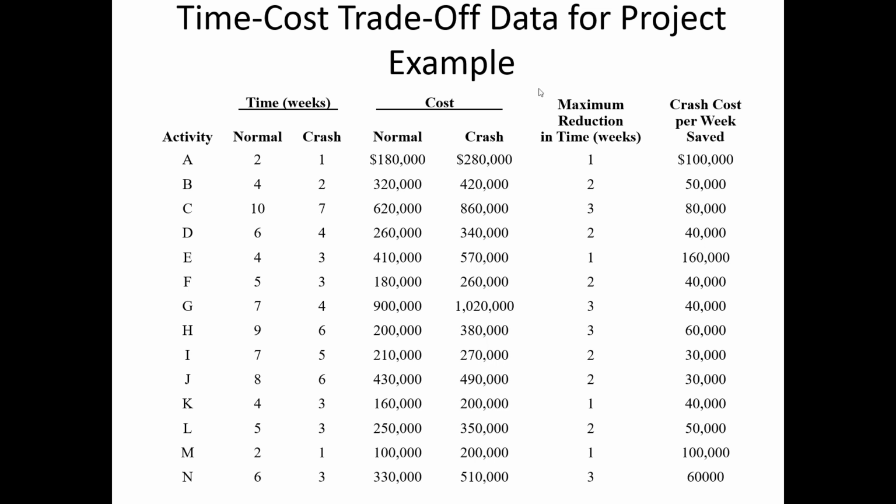Well, we look at A, $100,000, that's a lot of money. B, 50,000. A lot of money, but better than A, so B is winning right now. C is 80,000, too much. What else do we have? We have E, 160,000 for E. Well, E is out. There's just no math where E works, because 160,000 is more than the 150,000 bonus we could possibly get. So E is done. E is dead to us.